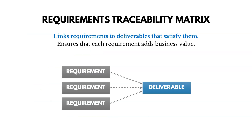Another output of the collect requirements process is the requirements traceability matrix. This links requirements to deliverables that satisfy them and ensures each requirement adds value by tracing it back to the business need. There must be a business reason for why we're doing these things, and we want to make sure the requirements actually trace back to that.